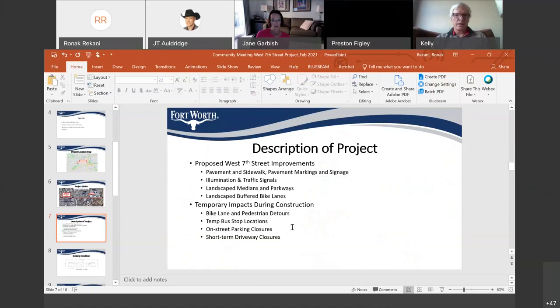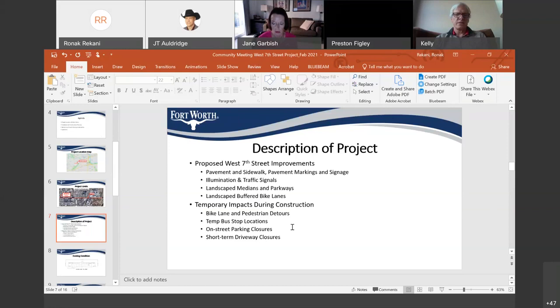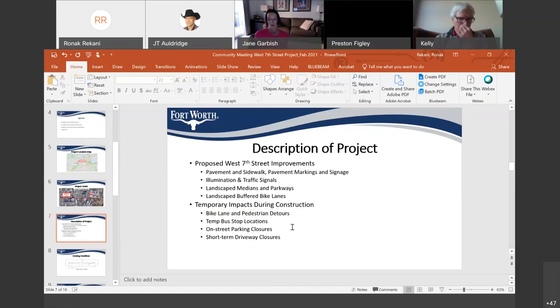There will be some temporary impacts during construction. Some of those are the detours that will be put in place for bicyclists as well as pedestrians. So, there will be proper signage up leading bicyclists and pedestrians to the proper route. There's also going to be temporary bus stop relocation just during construction. There will be some on-street parking closures along the eastbound side of West 7th, that'll be the southern side. There will also be some short-term driveway closures.